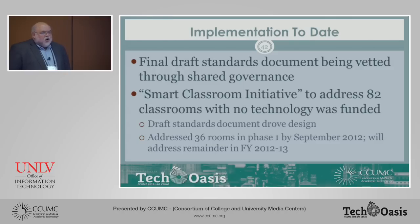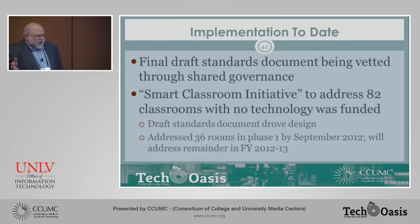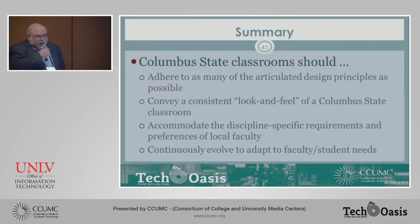We've created this draft document that has gone through many iterations with faculty committees. We're scheduling open forums to make sure everyone is happy with it and vetting it through the shared governance process. In the meantime, on the basis of this work, we triggered a proposal called the Smart Classroom Initiative to address the 82 rooms that had no technology — 82 out of 402 had nothing built in. That was approved and funded, and 36 of those rooms were created by the beginning of the fall term in line with the new standards.